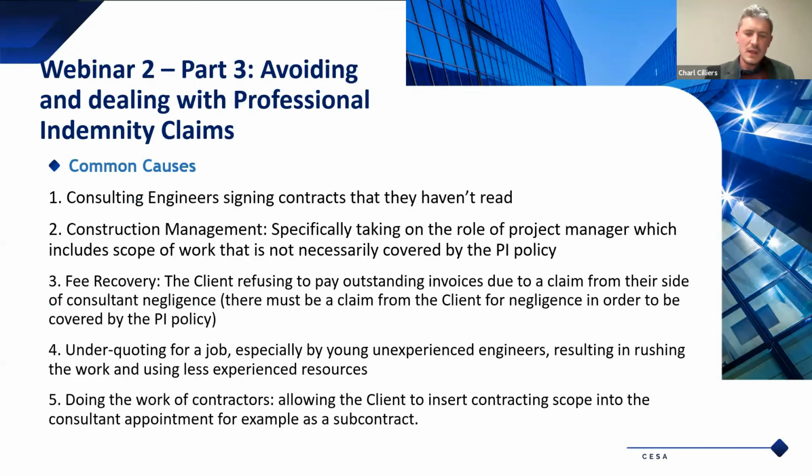But let's look at some common causes of what does lead to PI claims. Number one, consulting engineers signing contracts that they haven't read. Often the tender document goes in at the last minute, and then the client wants to meet with you and have the contract signed on the day, and they say you can read it later. But what you might be signing into is deliverables that you're not competent for, or deadlines that you can't meet, or a budget which won't cover all the work that you know you have to do. So just beware of signing contracts that you haven't read, because once they're signed, you're committed.